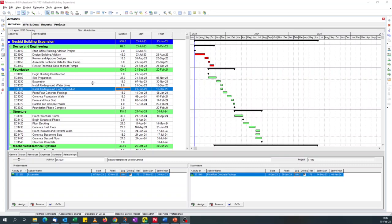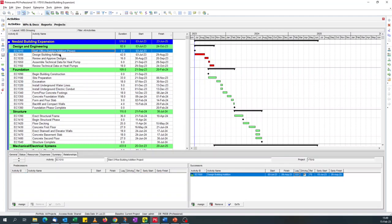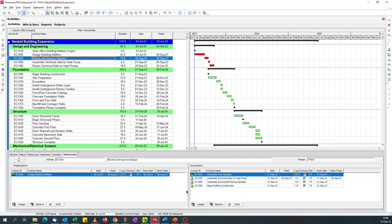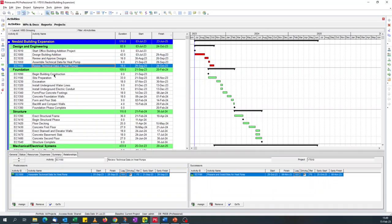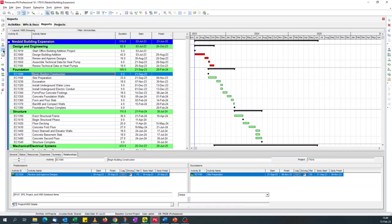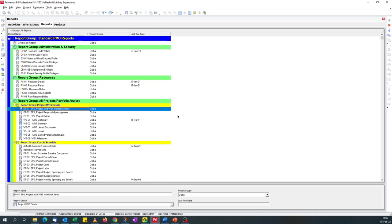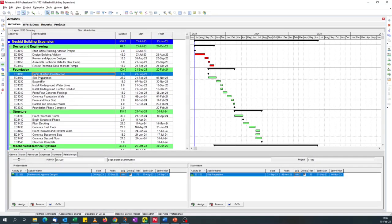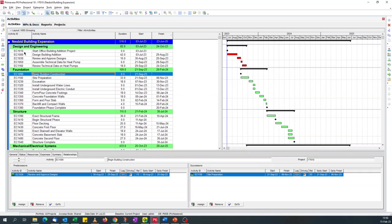Traditionally, if you want to see the lags in the schedule, you have to either go to each activity and check under the details form if it has a lag or not. The recommended method is to create a report where you define your criteria for finding lags, giving you a PDF or Excel version. But most people in meetings, or when checking a contractor schedule, would love to do it using filters.